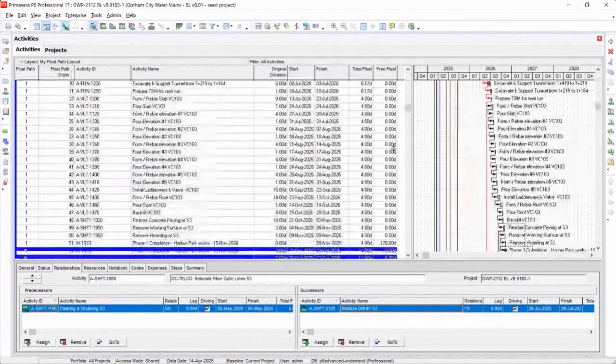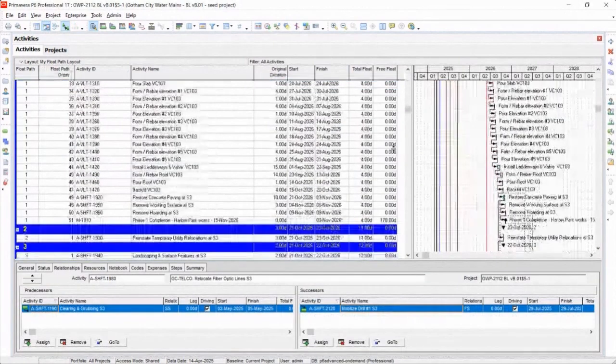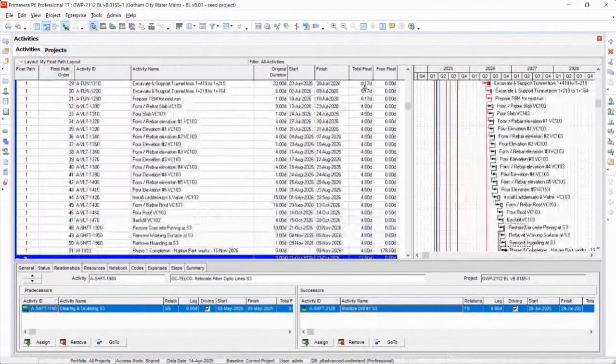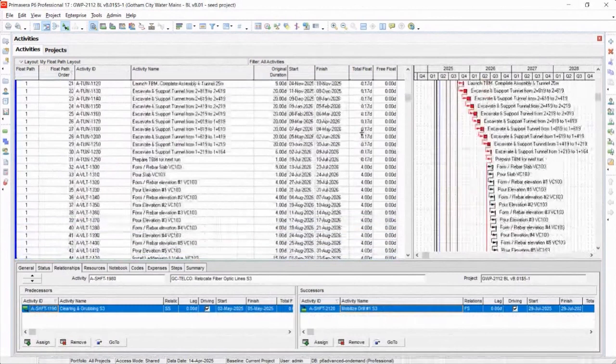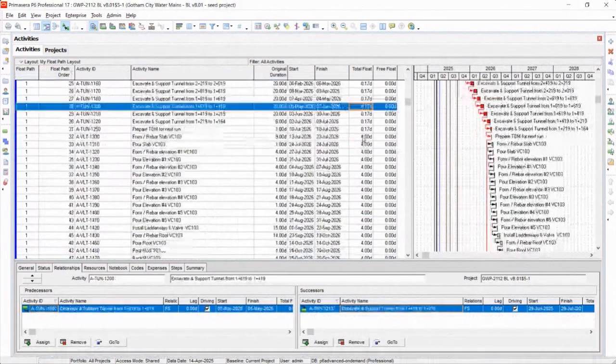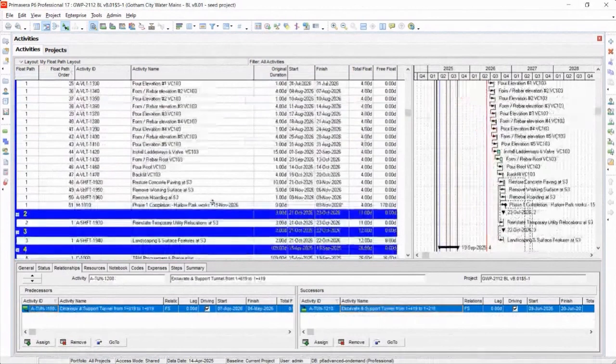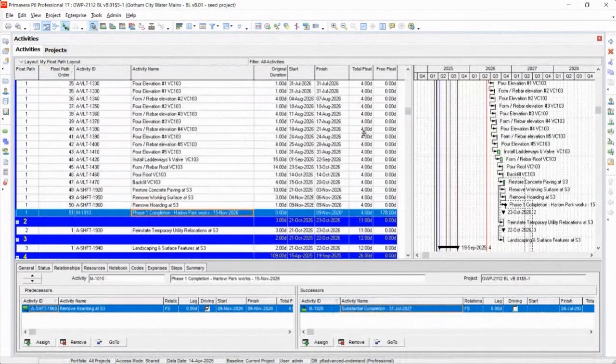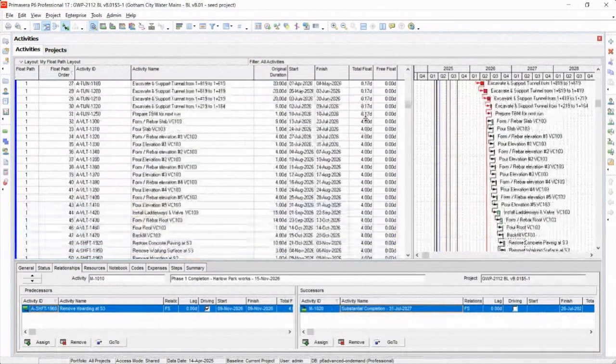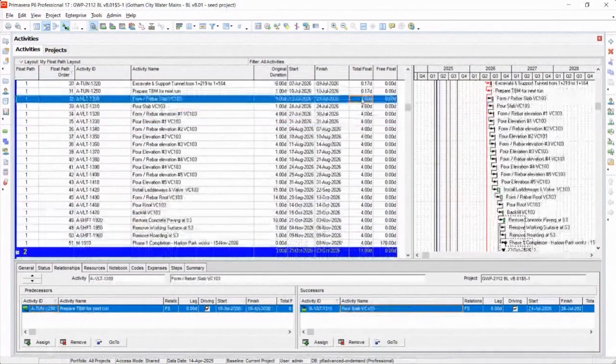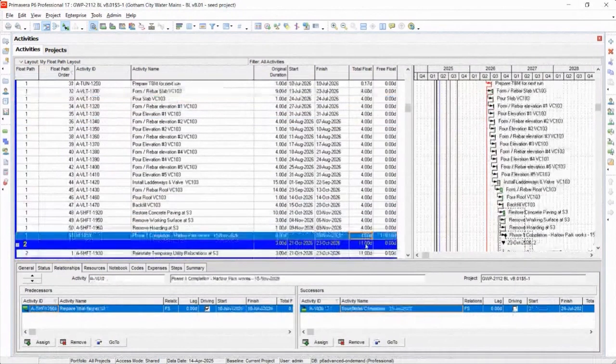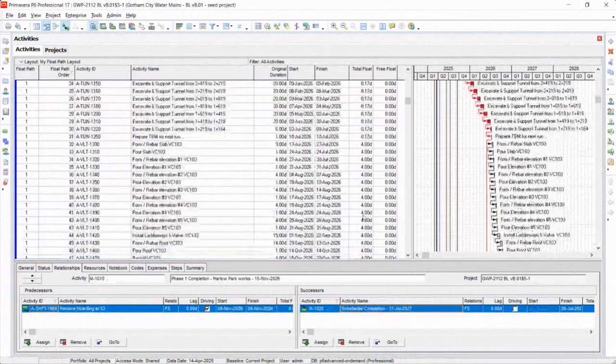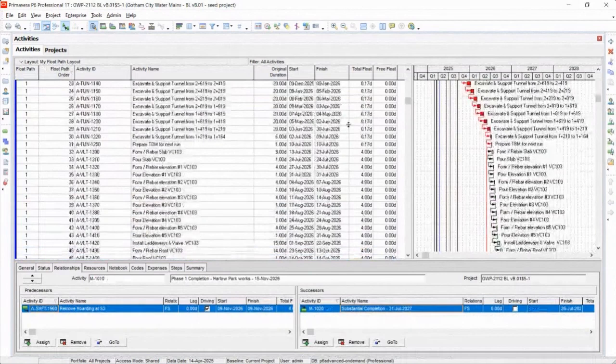Okay, so anytime we're quantifying near-critical activities, we're going to use total float to quantify them. Like even on this path to the first milestone, you can see that there's some activities with some float. These guys have four days of total float to get to this milestone.